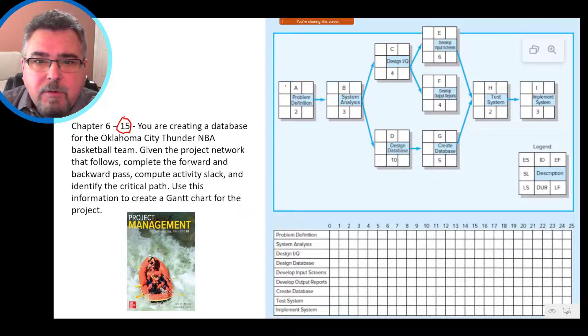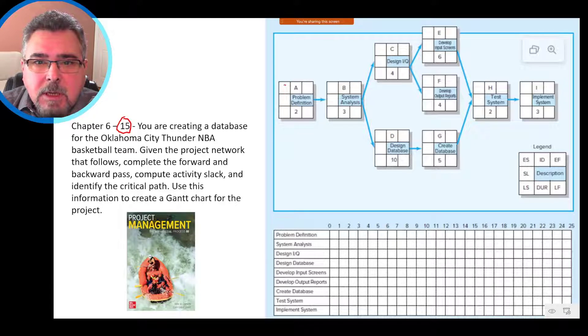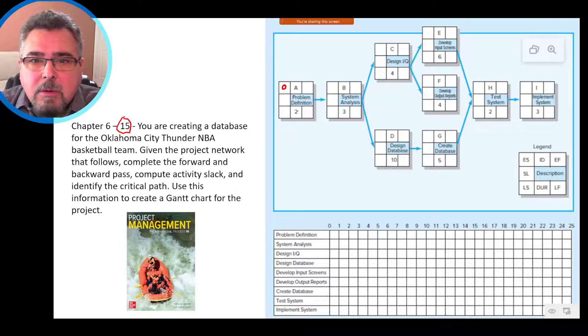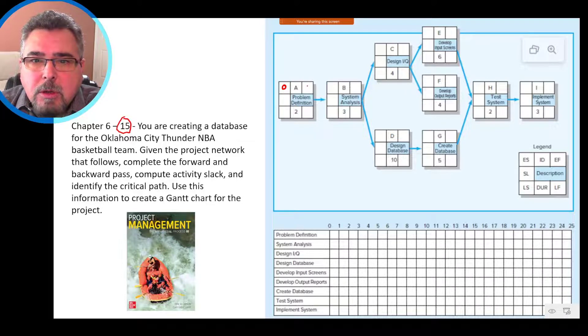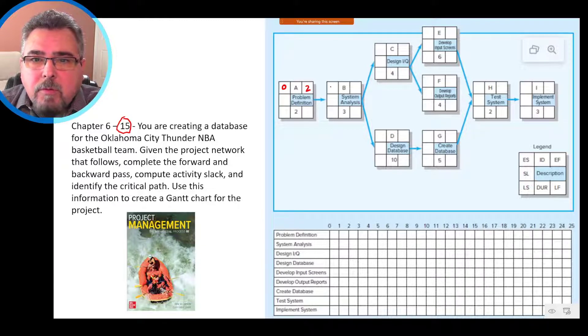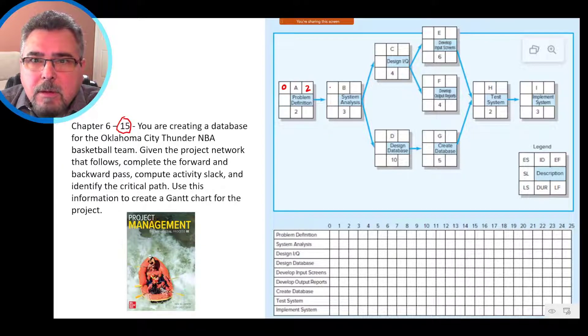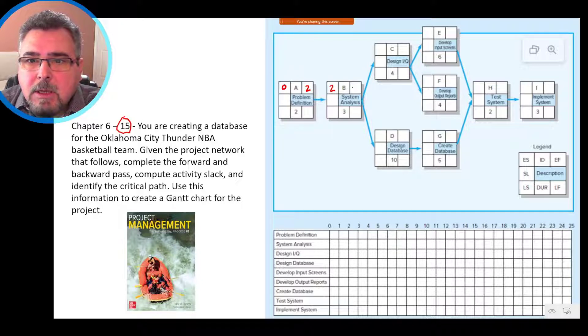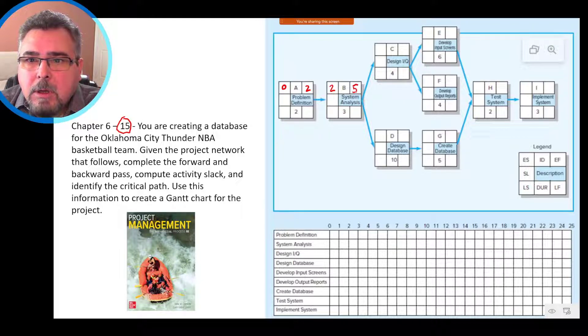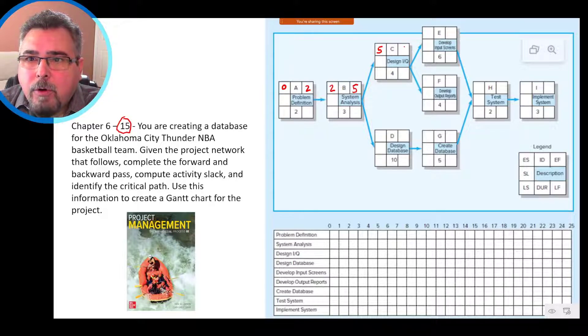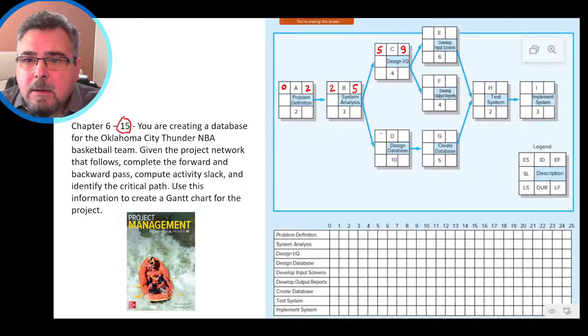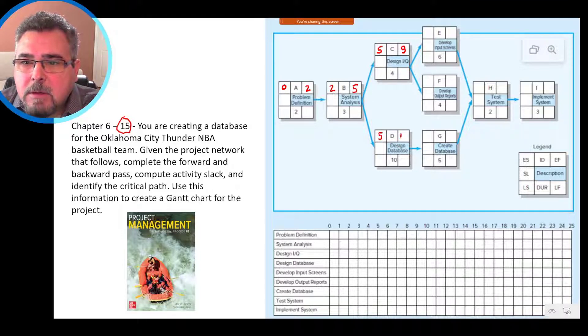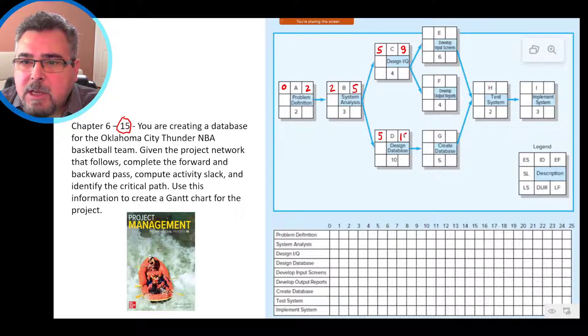We start from the first activity, we put zero, so that activity starts from zero, plus two, two. Then we move to the following activity, two, two plus three, five. We move five, five plus four, nine. So here we move five, because it's a burst activity, five plus ten, 15.